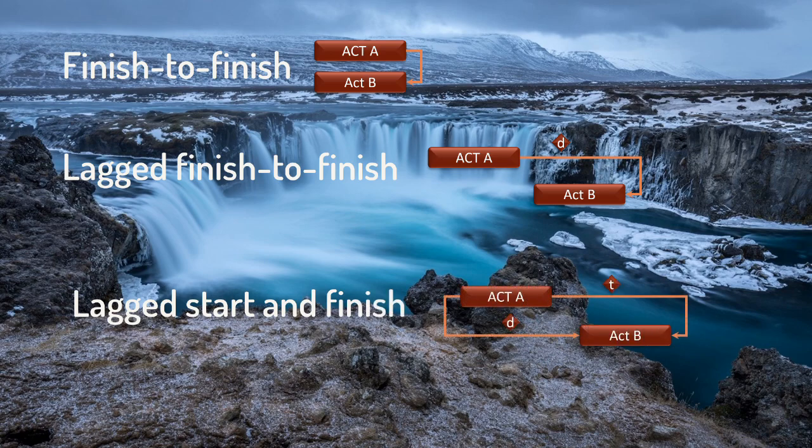The last one, lagged start and finish: there may be occasions where a lag is required both on the start and finish of related activities. Activity B cannot start until D days after activity A has started, and activity B cannot finish until T days after activity A has finished.